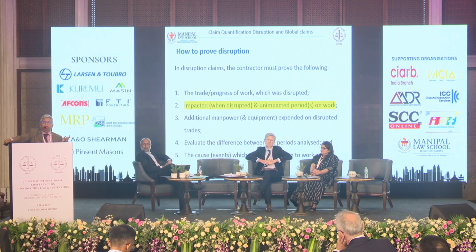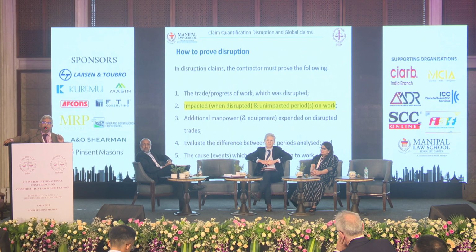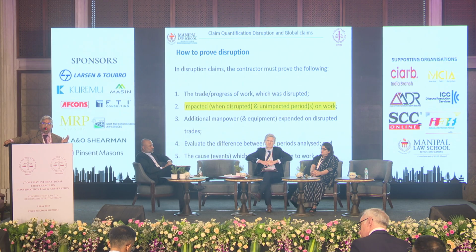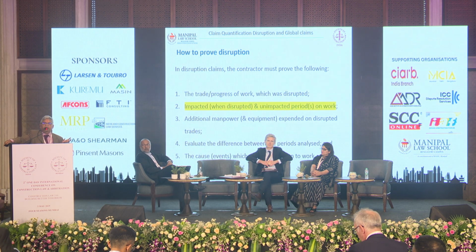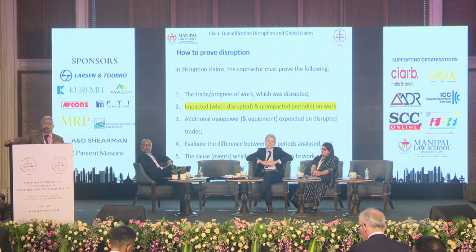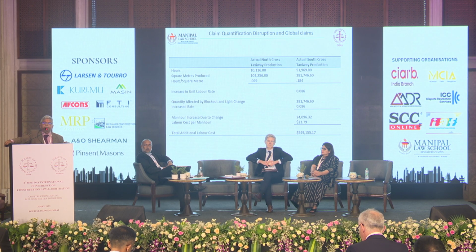Hence, he is entitled for a compensation. Or in the same construction site, two different parts of the construction site where the works are progressing well in one area, in another area it is disrupted. So we were able to prove that there is a disruption on that. So this is where the measured mile comes into that.